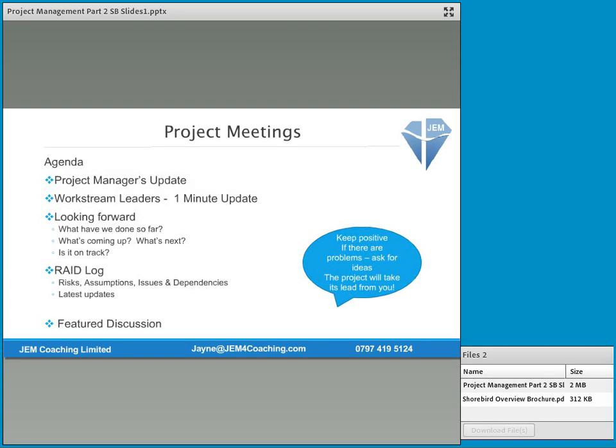I've then got a suggested agenda. I would suggest that a good project management meeting would have a project manager's update. So this is where we are, this is what I know. Then suggest to each work stream leader that they have a minute and no more to say what are our highlights, what have we achieved, what are we pleased with, what are our challenges. Keeping it really snappy, I sometimes say you can say three things that have gone really well, three challenges, and you can ask two questions or something. So it keeps it really snappy.